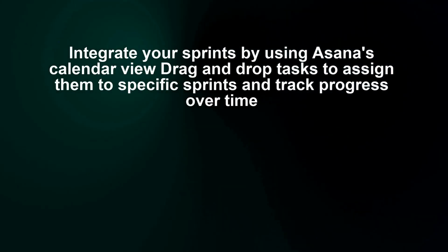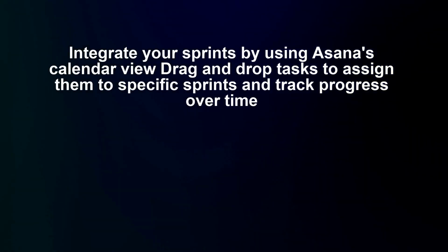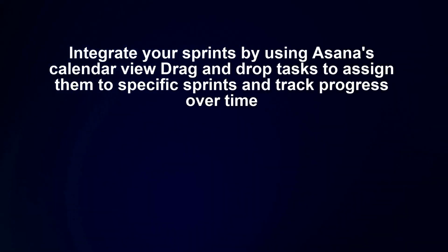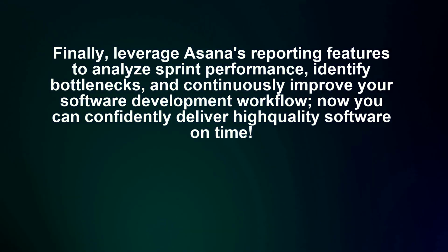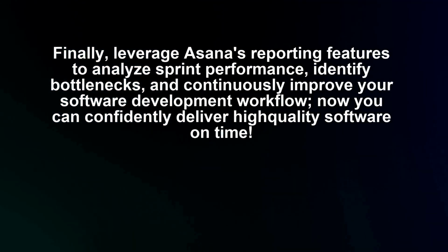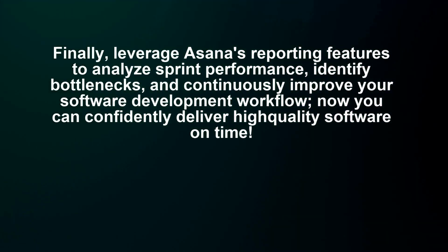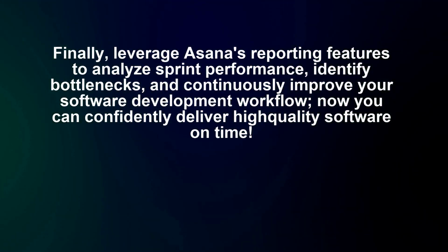Integrate your sprints by using Asana's calendar view. Drag and drop tasks to assign them to specific sprints and track progress over time. Finally, leverage Asana's reporting features to analyze sprint performance, identify bottlenecks, and continuously improve your software development workflow. Now you can confidently deliver high-quality software on time.